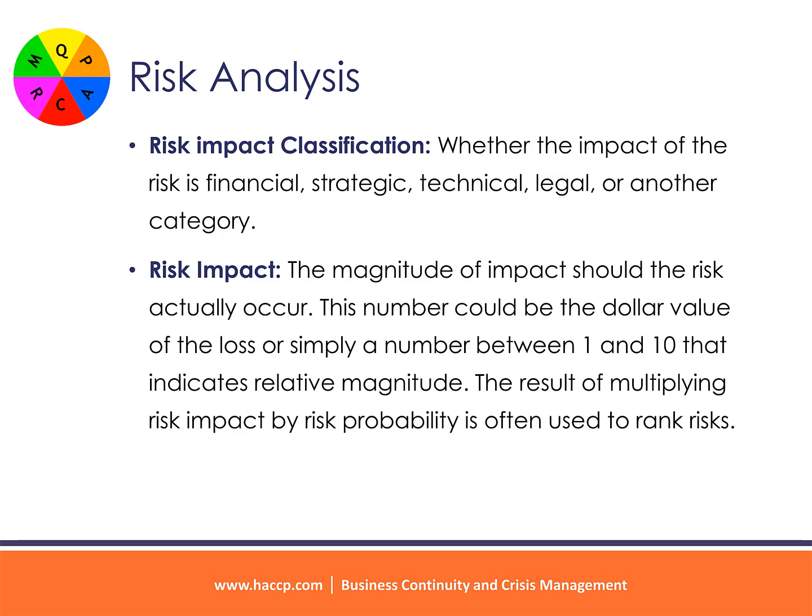Risk impact classification, whether the impact of the risk is financial, strategic, technical, legal, or another category. Risk impact, the magnitude of impact should the risk actually occur. This number could be the dollar value of the loss or simply a number between 1 and 10 that indicates relative magnitude. The result of multiplying risk impact by risk probability is often used to rank risks.